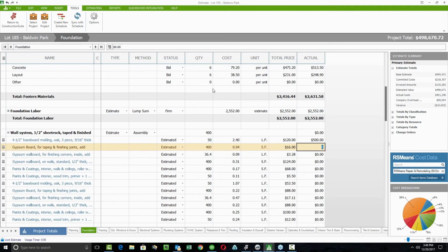So if you connect various different sections using a dimension, then you put in that one measurement, and that one measurement, much like the assembly is working here, can update several areas in the estimate. I find that it's very common when you guys are working through something like exterior finishes, which could apply if you're doing siding. It might include the siding, or the removal of the existing siding, or the weatherproofing, or any dry rot repairs or anything like that.